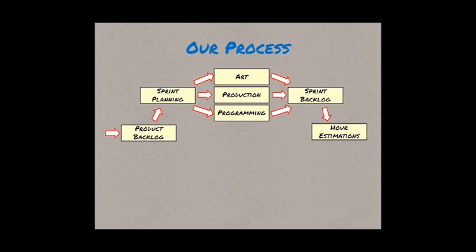We'd have some people with less hours, and we found ourselves occasionally trying to add tasks. I'm going to give you 4 hours of gameplay time just to play with the game and see if you can find any bugs. Like, more loose tasks like that we ended up adding on occasion. So I think story points might have helped that, because then we could compare the tasks relative to each other, and we wouldn't be so pressured on keeping track of everyone's hours that they worked in the week.